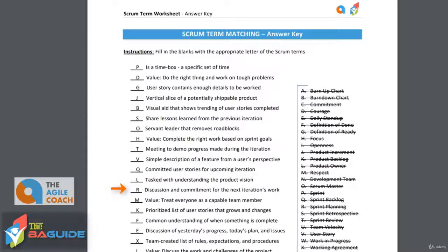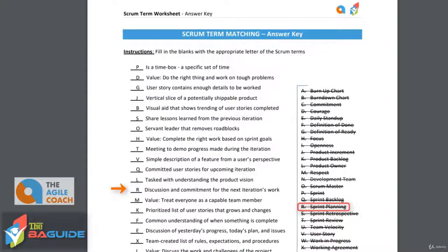Discussion and commitment for the next iteration's work — we know during this meeting we're creating that sprint backlog. We're committing to those stories as part of the sprint planning meeting. That sprint planning meeting is where we get together right at the end of the previous sprint and plan out our next sprint.